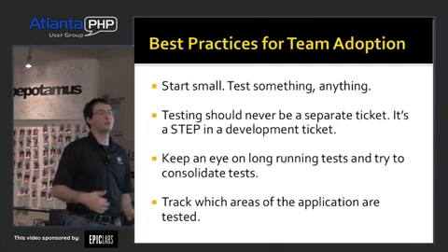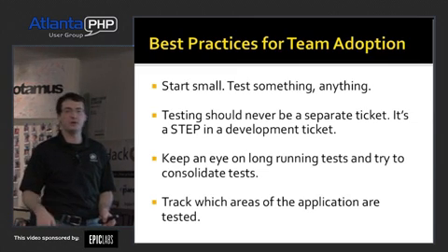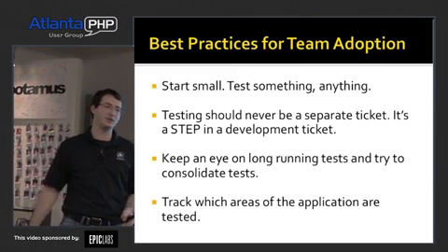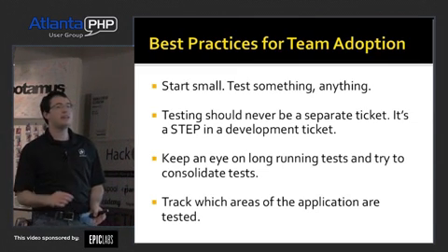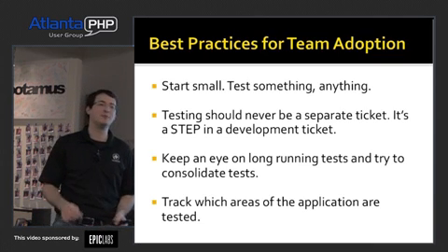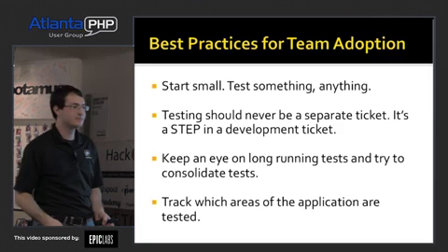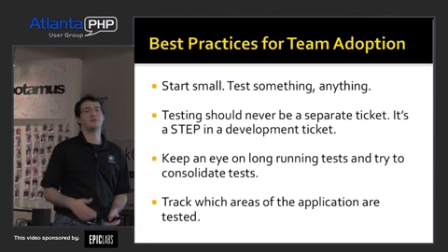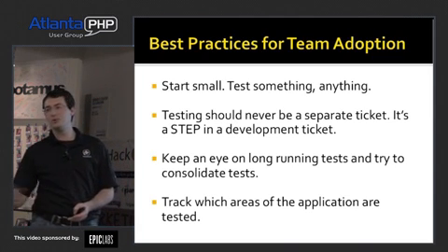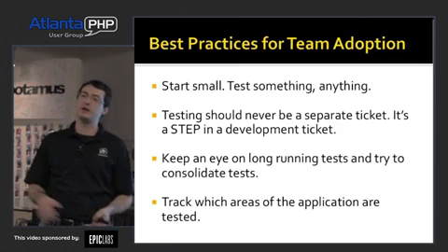Because some project manager, whoever's managing your queue, is going to come by and say, look, we're running behind, testing's the first thing out the door. If you put testing as a step in the development ticket, the ticket's not done until the tests are written for it. Think about that for a second. That's a paradigm shift, but I've seen it work in so many different companies out there.